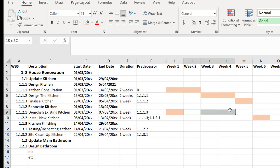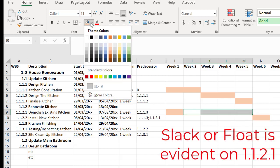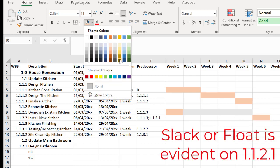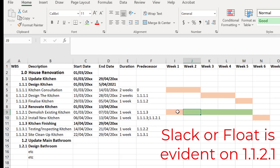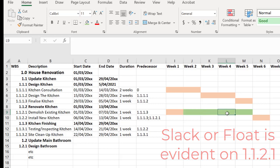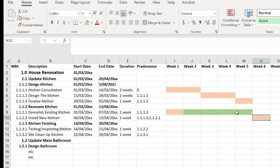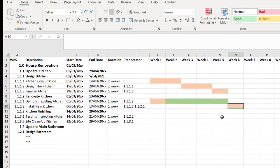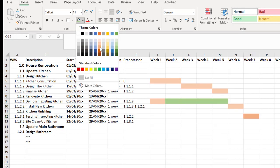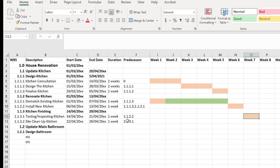So immediately we can see that we have some slack or float here. I'm just going to turn that green. So technically this means we could demolish the kitchen in week one, week two, three, four or five but it must be completed in time for the installation to begin. This gives us some scheduling complexity and tells us that demolishing the kitchen is not on the critical path according to this Gantt chart. Testing and inspecting well that's going to happen at the end so let's put that there. And lastly site cleanup is going to happen here in week eight.